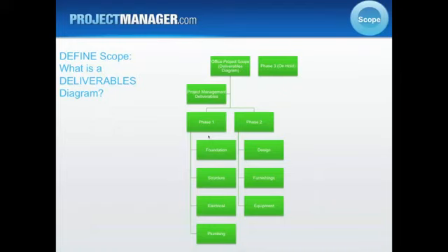This one is just a high level of an office project, and the scope in the deliverables diagram. Within this, you'll see phase 3 is sitting out there by itself. It's on hold. It hasn't truly been defined yet. It's identified, but a placeholder held out there by itself. If you look below the office project at the deliverables diagram of the scope, you see project management deliverables, which can be broken out into a lot of different things. Here we've identified 2 phases of this project.